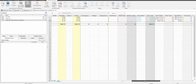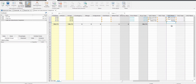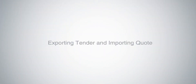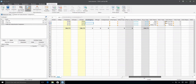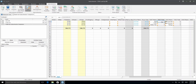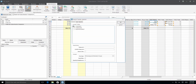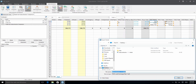Now two subcontractors have been assigned to each of the three trades. The next step is to fill in the subcontractors' prices. Workbooks can be exported and sent to the subcontractor to be opened in i2 CostX Viewer or Excel. Once opened, quotes can be entered, saved, and sent back by the subcontractor or supplier for us to import back into i2 CostX. Let's practice this for the concrete trade using the i2 CostX Viewer method. We can click on any cell in the concrete row, then click the export tender button. In the prompt window, make sure the concrete trade is ticked and click OK to export the workbook.